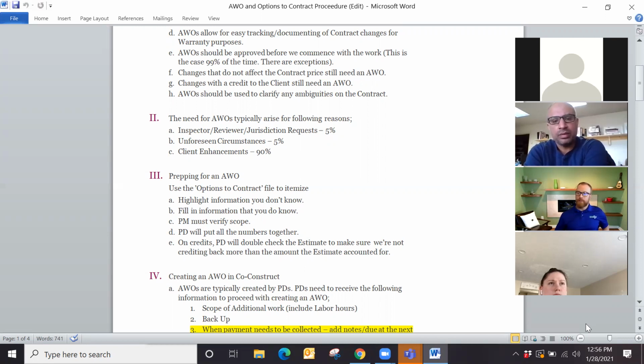Yes, I think a conversation happens with the client first, so they're not blindsided. A lot of times it's good to show them what's happening, like if the area is still open, or if there are pictures. The reason I say that, I'm thinking about plywood replacement, like when we do roofing and things like that. That's another missed opportunity. I think it's in the contract that we let the clients know that if there's rotted plywood that needs to be replaced, there'll be additional cost. But it's rare that we go back to get that from them. It's nice to have pictures, like, hey, we have to do a few sheets here, this is the additional cost.